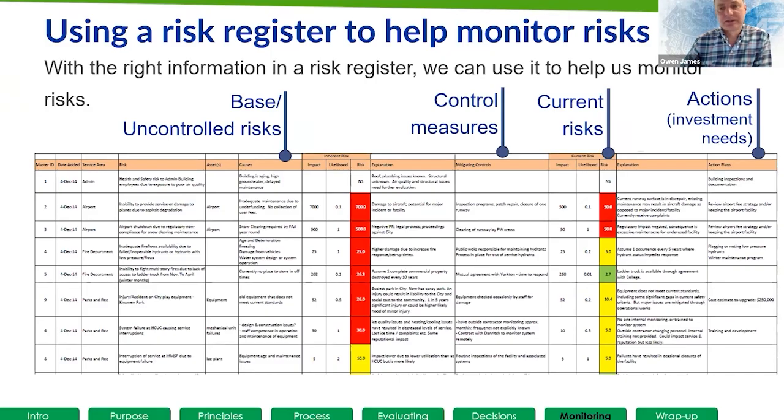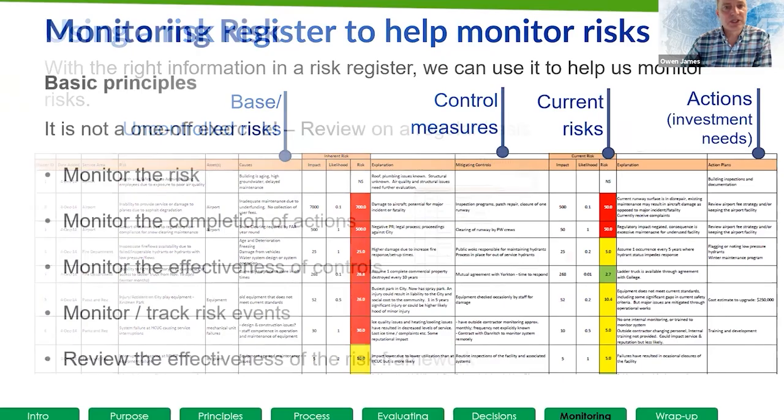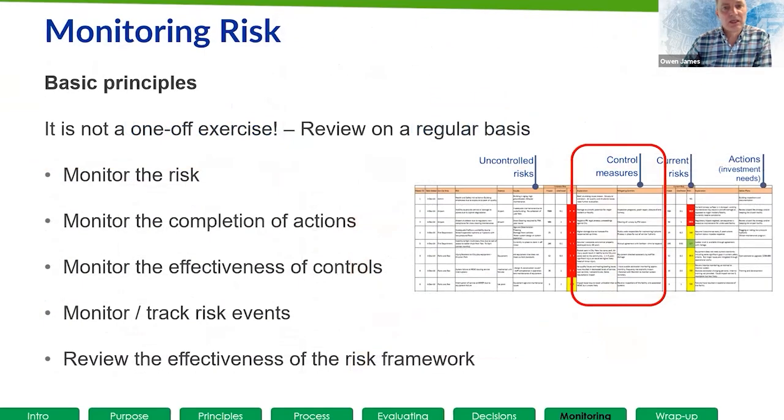Are they not started? I think the other thing I want to touch on very briefly is the control measures. We think those controls are in place, but unless we actually check them, we really have no idea. So monitoring risk and risk controls is critical. If the inherent risk is high, and we're assuming that with those controls in place, the current level of risk is low, then those controls better be working.